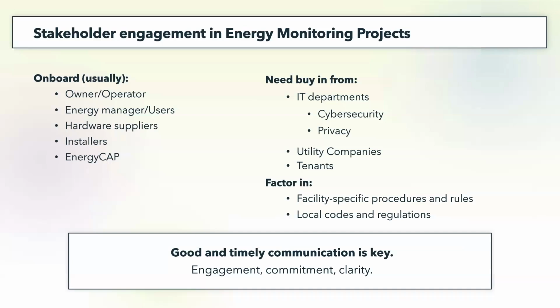Keep in mind facility specific procedures and rules. What do I mean by that? If it's a school, people might need vetting to go in there. People might need to go there at specific hours, maybe after hours, maybe during the weekends. If it's a hospital, things like shutting down power are very challenging, so that needs to be discussed in advance. You might need to test people. You might need to go there at specific times. People might need to wear specific personal protective equipment, such as masks and things like that.